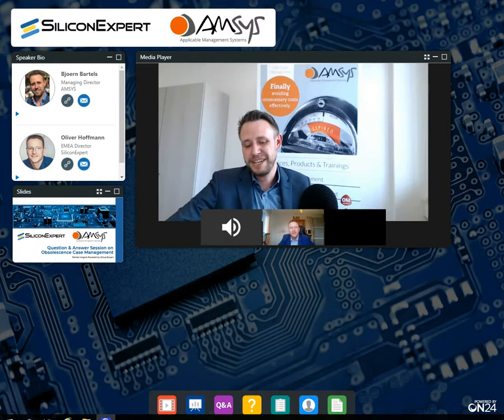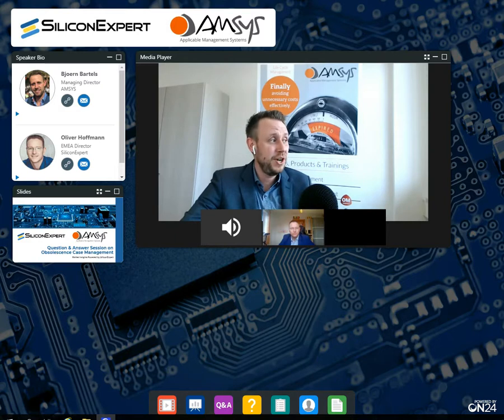But maybe we should start off with, what does proactive obsolescence management mean? Again, as I've worked in the maintenance group of the latest IEC 62402 revision, what usually needs to be done when it comes to proactive obsolescence management, first of all, you need a good configuration of your overall system. That's a must. If you don't have it, you should stop right away. And we have seen so many companies struggling with good internal data and so on. Another thing that you usually need to make proactive obsolescence management work is resources.